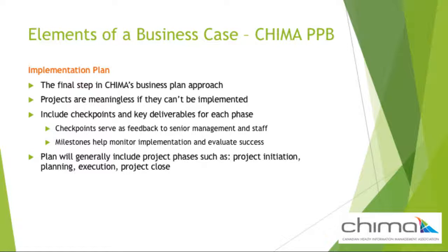The implementation plan is the final step in CHIMA's approach. This step is important since projects are meaningless if they can't actually be implemented. The plan will be at a very high level as you are not far enough along to be able to report details yet. However, you should include both checkpoints and milestones. Checkpoints serve as feedback to senior management and staff, and milestones help monitor the implementation and evaluate success.